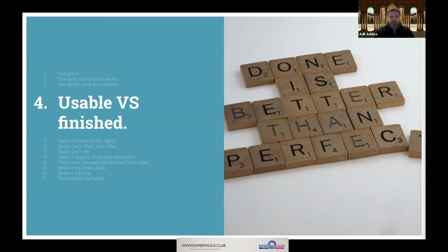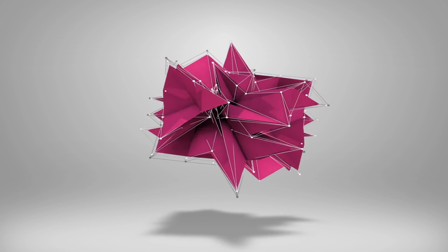Even if a feature is not completed, if you have done enough work for the client to use it as intended, even if it's a little bit buggy or still lacking some testing, it might be a good place to show it to the client and see how they react to it. Maybe what you are building is not even something they are looking for, or maybe it is but they might need some little adjustment, or maybe the rest of the feature is not even needed. So once there is something that might be usable, it's time to show it.